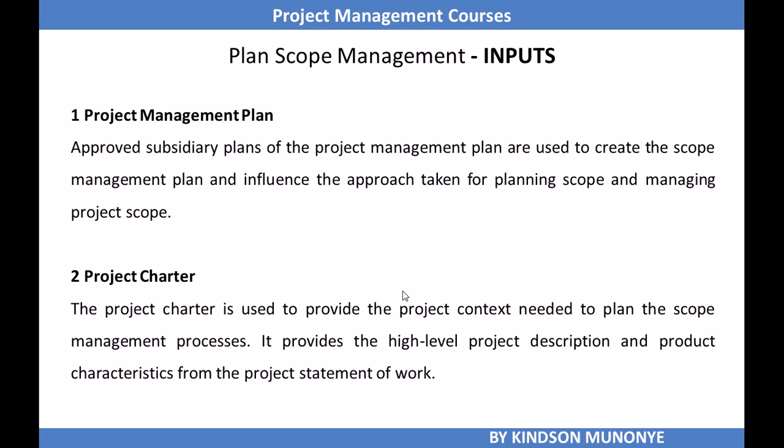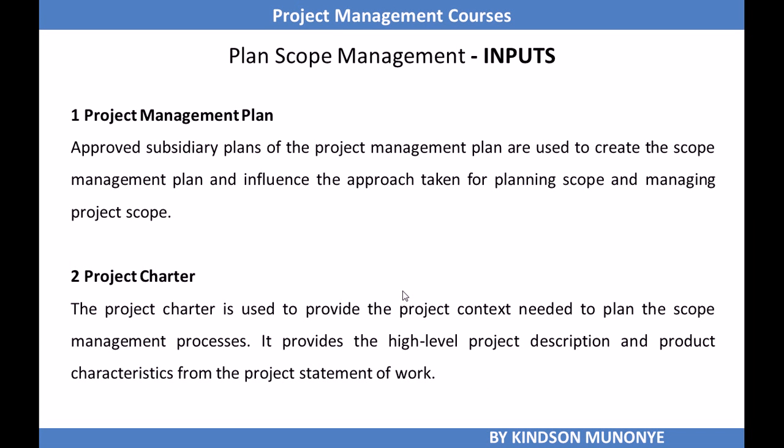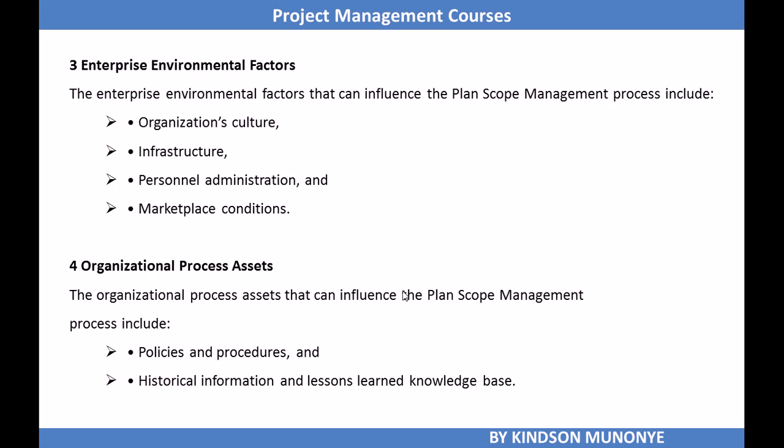We do need the project management plan for plan scope management, because the project management plan contains all other subsidiary plans of the project, and this can influence the approach taken to plan scope management and managing scope. We do need the project charter as an input, which provides the project context needed to plan scope management, providing high-level project description and product characteristics from the project statement of work. Remember, the project statement of work is one of the outputs of develop project charter.